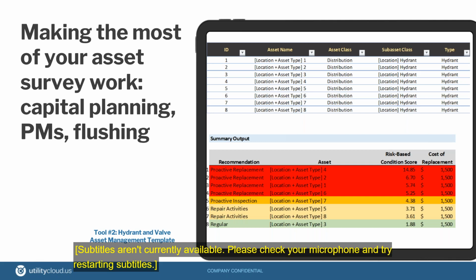And later on, we'll provide you some resources to understand what tools you should have and how you mitigate flooding and how you divert the water and so on. But generally, the point here is collect the information, make sure that it's ready, exercise it to ensure it's ready, and then also at the same time collect the asset management information to inform your future capital planning around those types of assets. We're going to give you guys in the tool pack an asset management data collection form. So this workbook you can fill out using Excel or other tabular program to not only assess the condition, but collect that asset management information and also assess readiness.